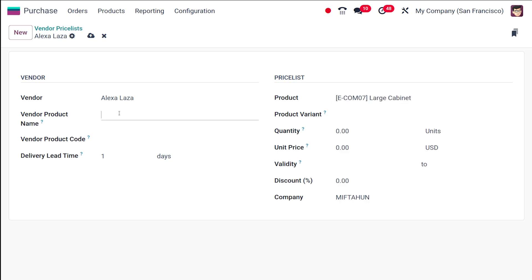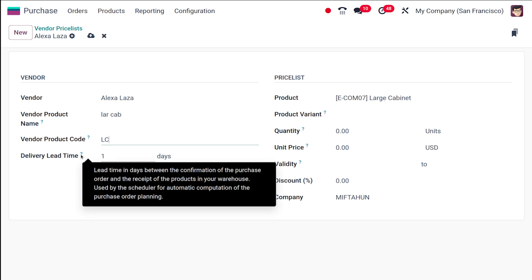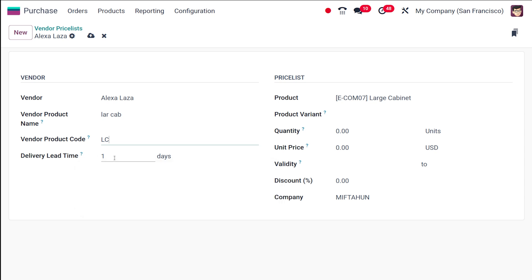For the Large Cabinet product, I'm setting the vendor-facing product name as 'LarCab' and the product code as 'LC'. Next is the delivery lead time — this is the number of days between the confirmation of the purchase order and the receipt of the product in your warehouse, used by the scheduler for automatic computation of purchase order planning. I'm setting the delivery lead time to two days.